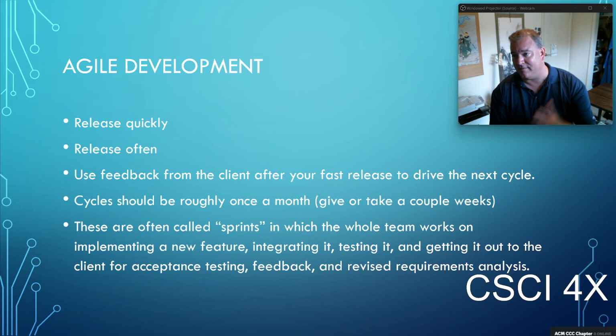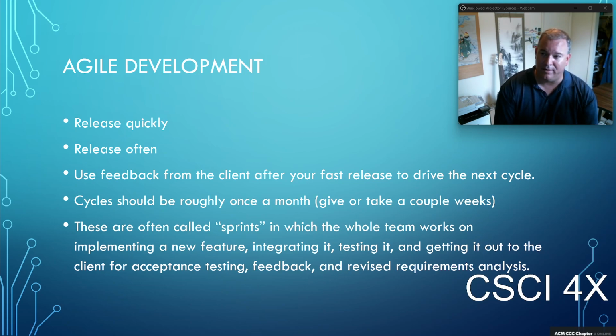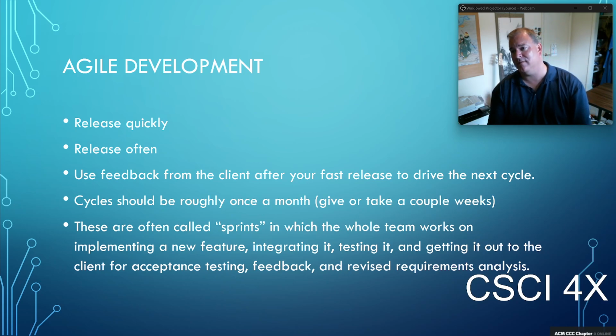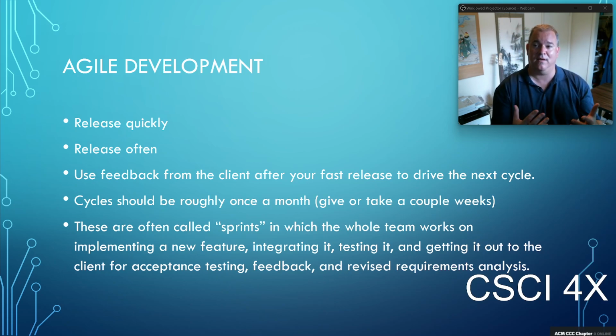The client comes back and says, "I hate it. You need to make the line travel the other way." And then you go, "Oh, okay," and you just fix it. While you're working on it, everything's still fresh in your memory. Everybody knows how to fix it right now. And so you're constantly iterating. You're constantly releasing. You're constantly testing, and you always have a product that works. You're always in a state where you've got something that you can sit down and play with, and it's working.